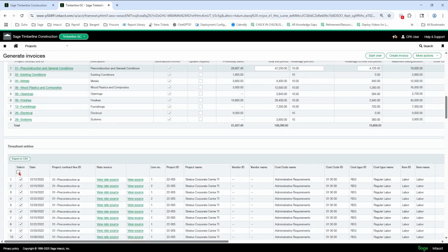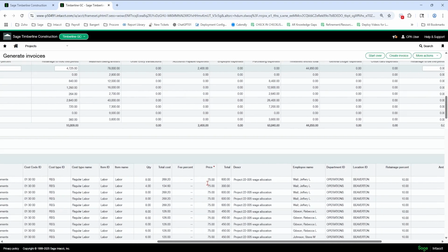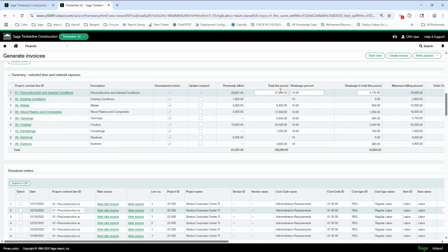So the right scenario, best practice would be to not use those, come down here and adjust in the price what you're doing, what you're trying to bring it down by or bring it up by. Remember, anytime you check mark something and it's going to be used and it won't come in again the next month or the next billing. Okay, so do not override the totals. That's a best practice.